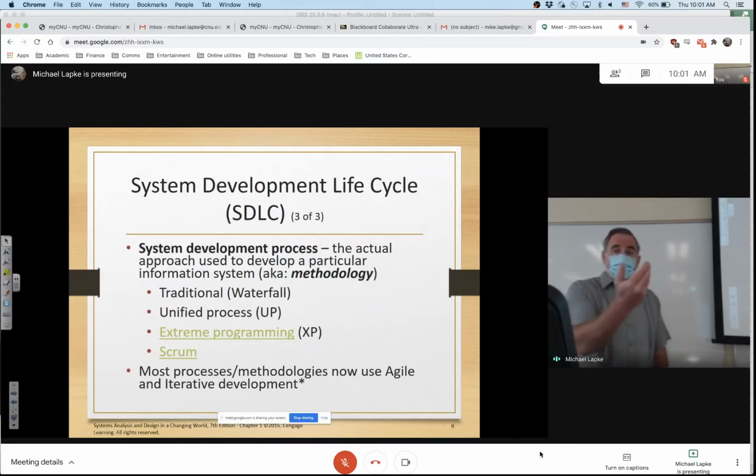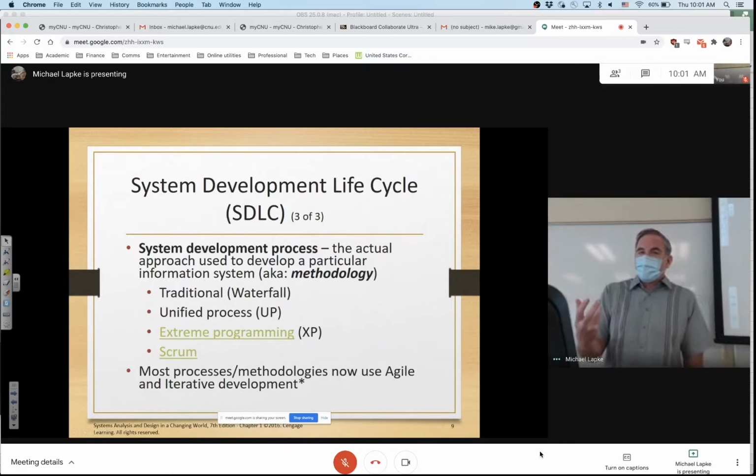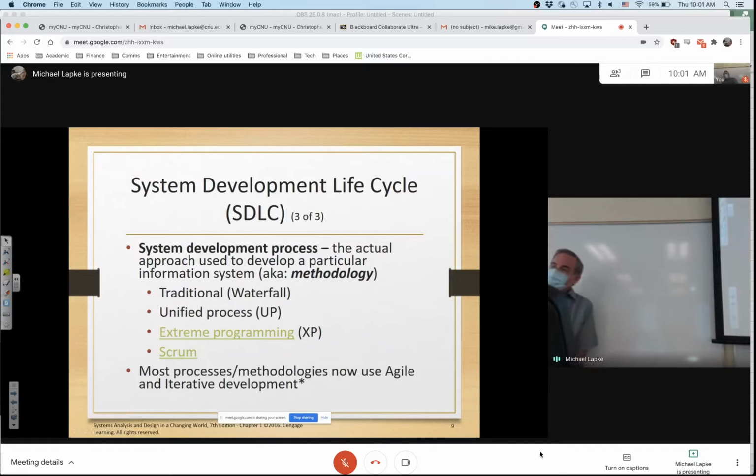Now, have you guys ever written code that you've planned a little, and you get deep down into it and you say, oh, I did not think that through right at all? I've got to go back and fix something. Of course that's going to happen. In the waterfall method, the prescribed action is to halt all activities for whatever phase you're currently in, go back to where the problem's sourced from, and start at that phase again. It's very rigid. You can see why a lot of people blame that particular methodology for the failure rates, because it is pretty rigid.